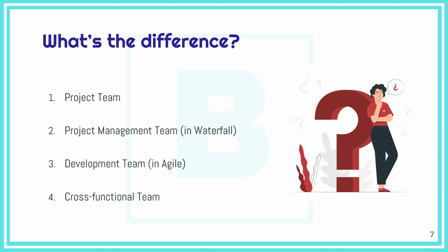Then we started section 3.2, which was about acquiring the team. It's really important that the project manager participates in the resourcing of the project. The project manager sometimes will have to participate in the acquiring process. The project manager might use some pre-assignment tools such as interviews, technical tests, ability tests, etc. And the project manager really needs to make sure if they need some I-shaped people, like people with only one specialty, or T-shaped people who have some general knowledge besides the specialty.